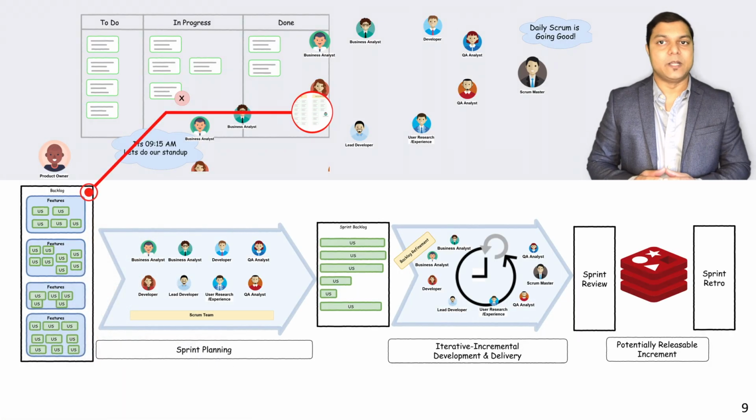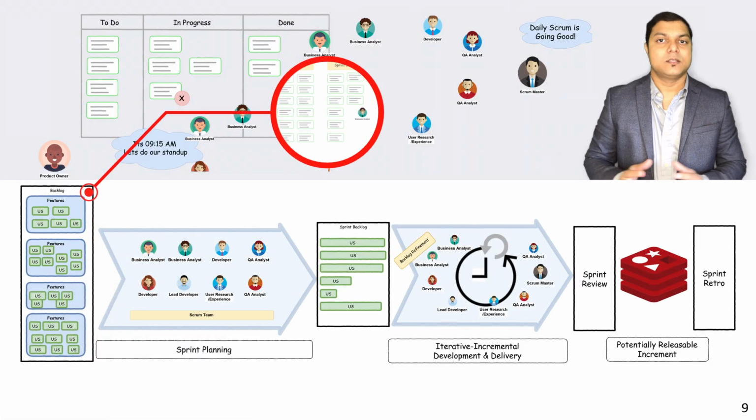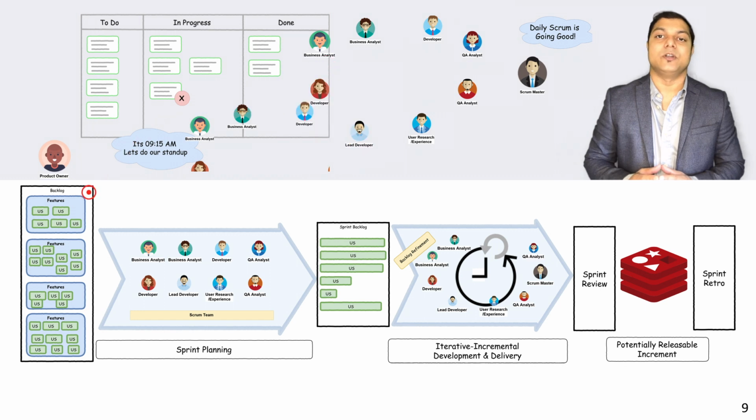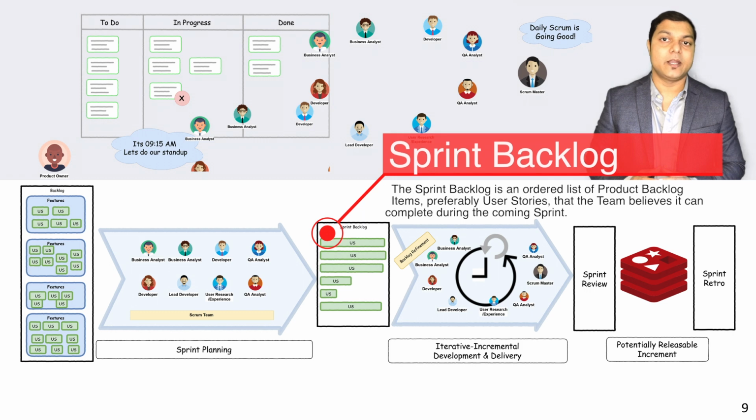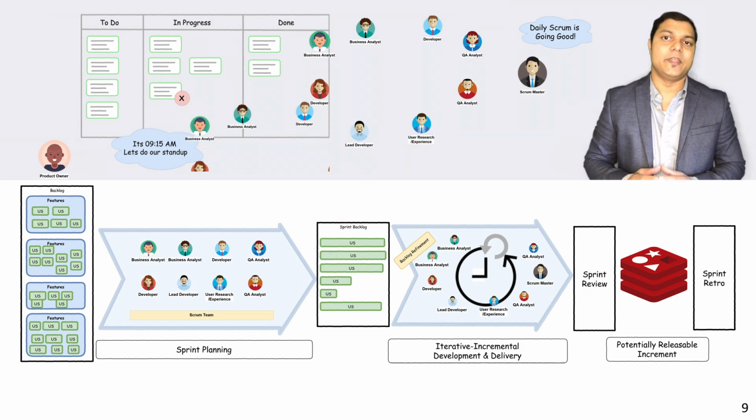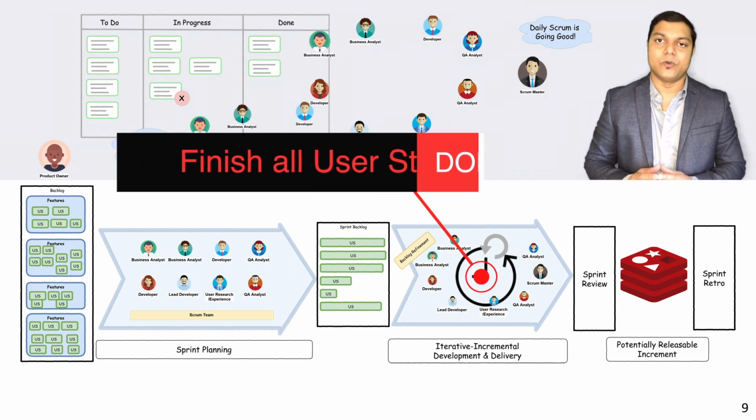Then it comes to the sprint planning and sprint backlog. The Scrum team selects the most important user stories from the product backlog. Then, team members should decide how they will solve this. The sprint backlog should be created next. It consists of user stories that will be completed during the current sprint. The amount of these stories depends on their duration in story points assigned to each story during the evaluation stage. The team should be capable of finishing all these stories on time.